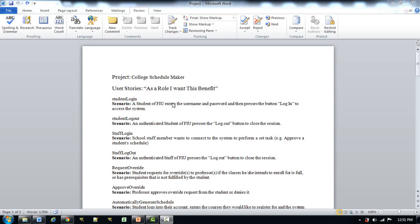In scrum, features are written in the form of user stories. These are basically like saying: as a role, I want this benefit. For this tutorial I will be using the scenarios in creating a website called the College Schedule Maker. I have jotted down some of the user stories in creating this website.